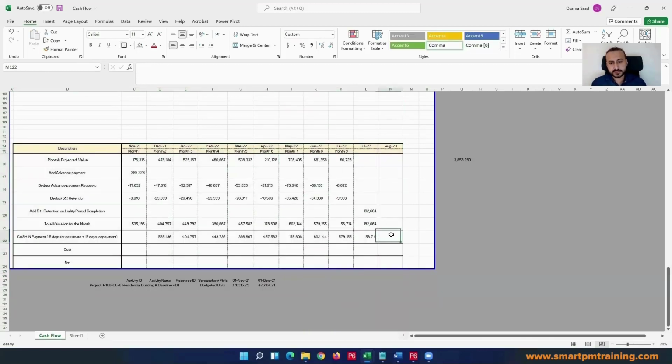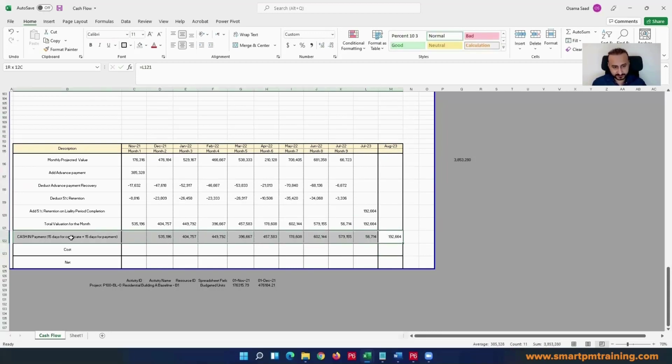Okay, so now I can get the value, my 5% back, but it will go through my bank account 1 month after. So this is the final expected cash in, okay, what you will just expect.